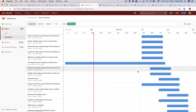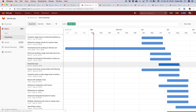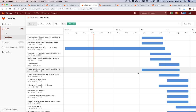The way I do top-down planning is: I create an epic, I haven't fleshed it out yet — maybe there's one or two issues or it's just a blank epic — but I set it far into the future with a start and end date. The important part is that I can communicate this roadmap to senior executives within GitLab, to my peers in other product groups, to engineering teams, and to the outside world, because we work transparently. Everything I'm showing is public on the internet.